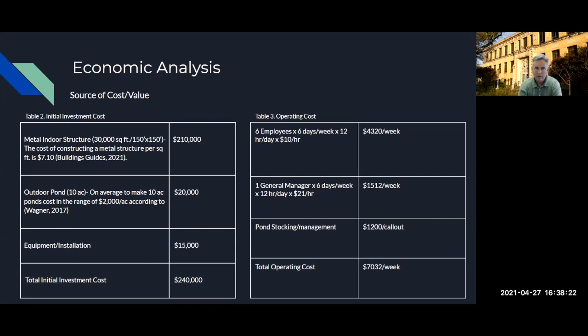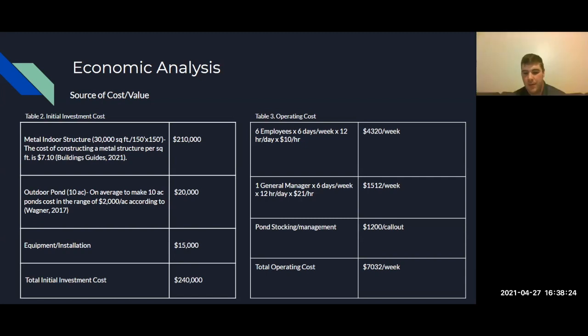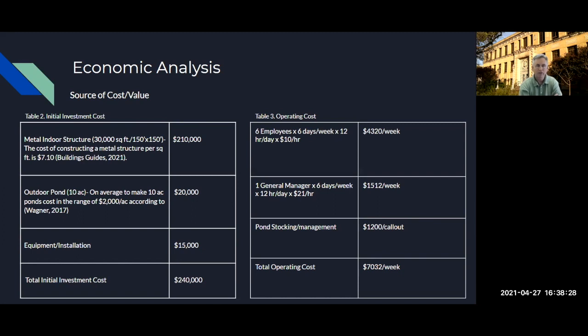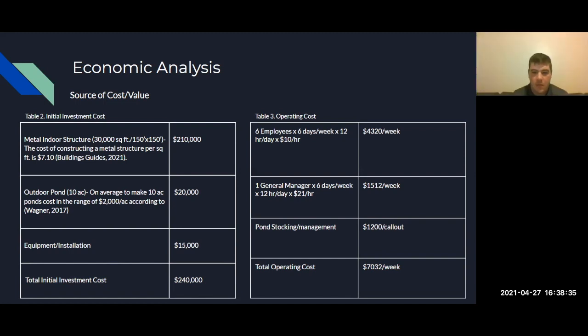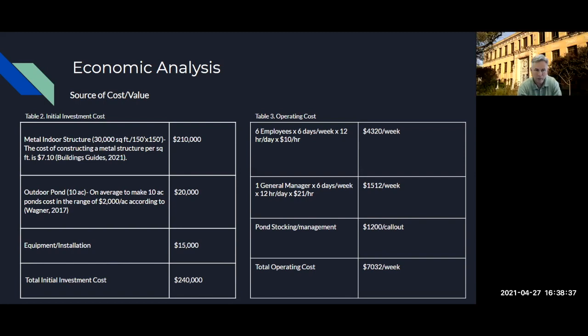Is $10 their pay rate? Yes, sir. $10 an hour. Yeah, well, you've got other employee costs, and you need to add another 20%. We call that the fringes, fringe benefits, and all other stuff. So you've omitted that. You'll need to do that for all your employees.